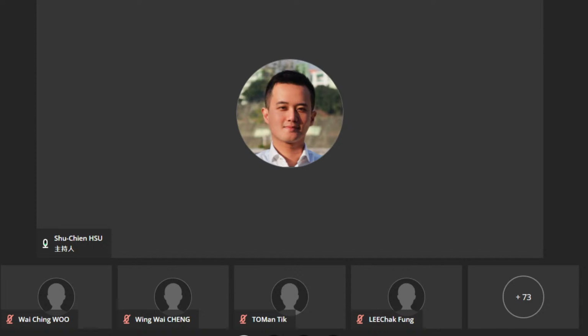What is Michael's question? I would say the bar chart just shows the overall schedule, right? But the final bar chart has considered the resource constraint. Like I said, the final bar chart should be after the resource leveling, so that the bar chart will be the real schedule that fulfills the resource requirements and also fulfills some rules.